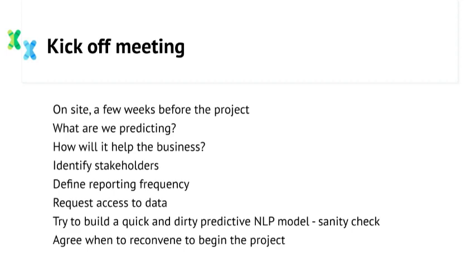So I've seen a number of projects fail in large organizations because the reporting chain between the data science team and the stakeholders had too many links. We can define the reporting frequency and the person to contact in case of anything blocking the project. We need to request access to the organization's version control, ticketing systems such as Jira, and any cloud computing accounts. We need to request physical access to the client's site if applicable, and their computer systems. We need to request access to all in-house data sources, any third-party data sources, and also any APIs.